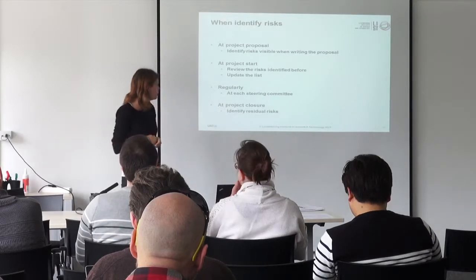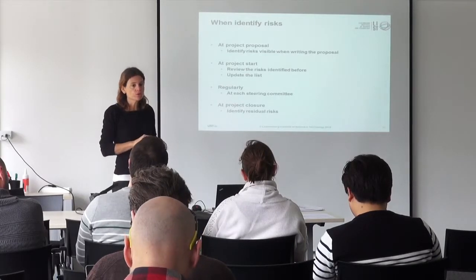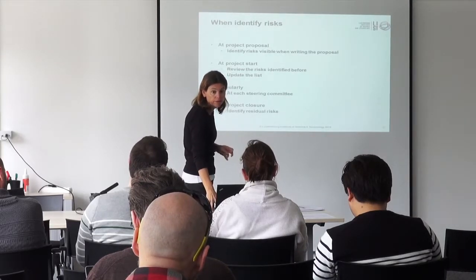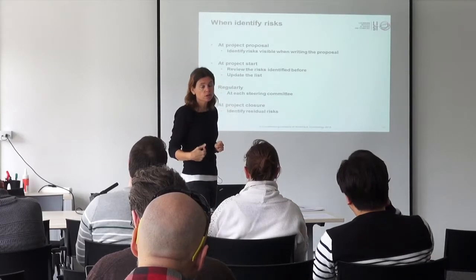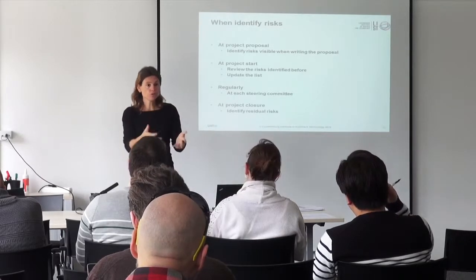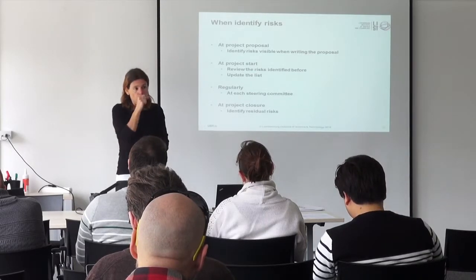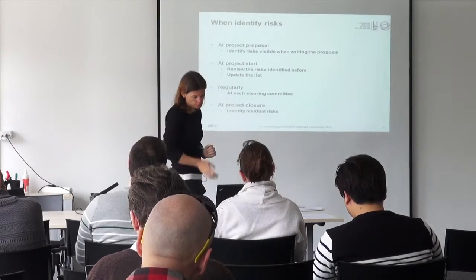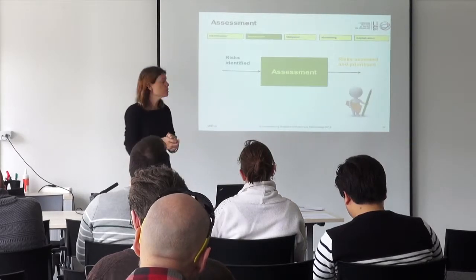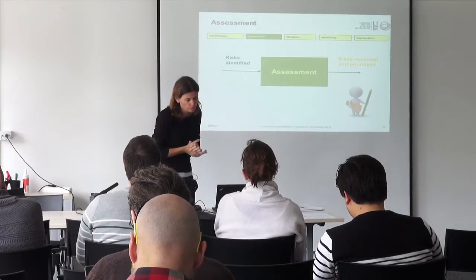And of course, as we said, at project closure, it's really a good thing to think back about how you do your risk management. Do you still have some risks that are there that you need to treat, even if the project is closing and your project organization is gone? You pass over your solution to some permanent team, and they need to be aware of some risk, maybe. So you need to identify this risk and identify some people responsible for this. Okay, second step, and then we'll have a break.